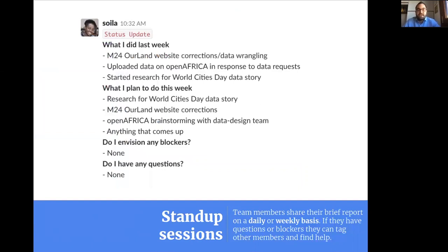This is how a stand-up session looks. This is taken from one of our stand-up channels. We explain what every single individual did last week. In this case, it's a weekly stand-up, so that's why it's on a weekly basis. So, what I did last week, then a bullet point list with all the items, then what I'm planning to do this week, and then do I envision any blockers or not?